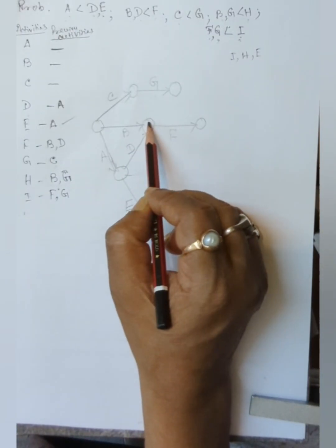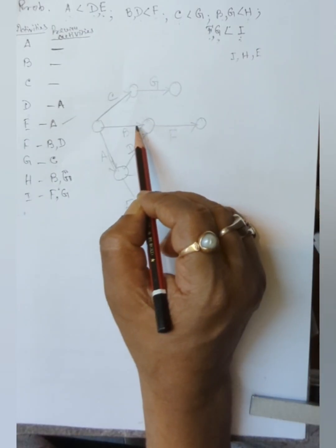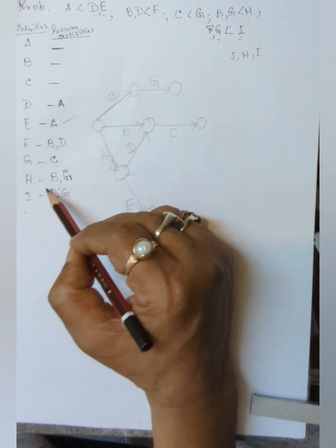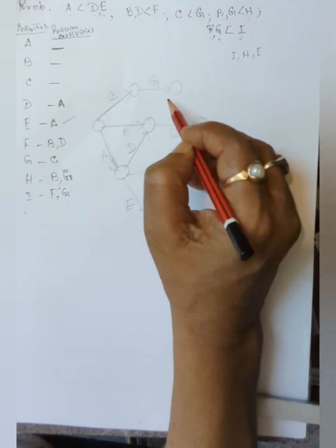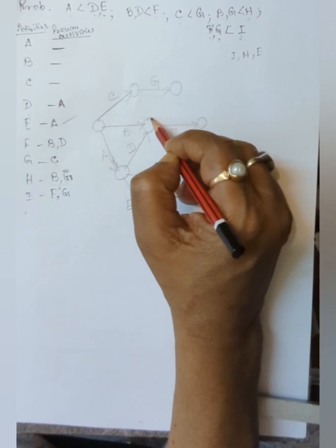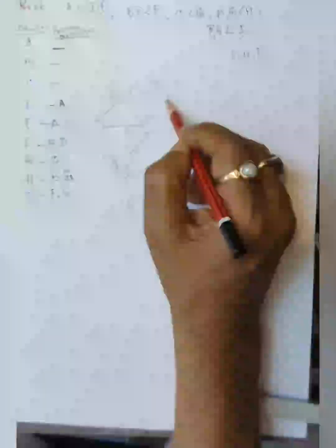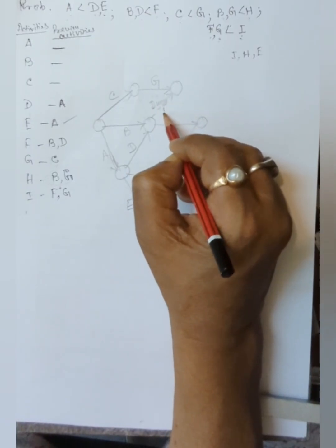You cannot merge this here. If you draw it here, then what will happen? B and G, but D will also be included. But here the condition is only B and G as the previous activities. That's why, for B and G, what we will do: this is B and this is G. Here a dummy will be used to show the perfect relationship. Say this is dummy 1.